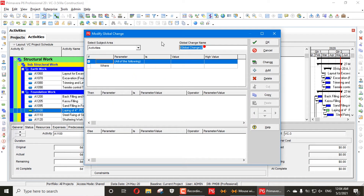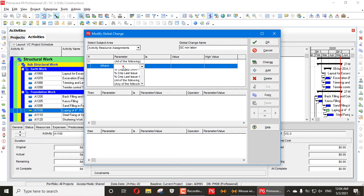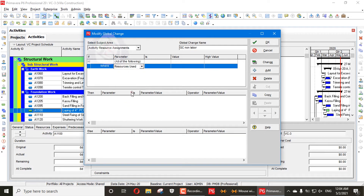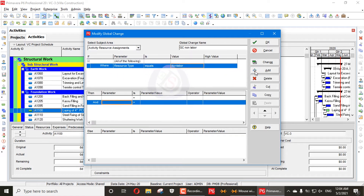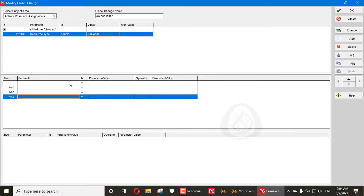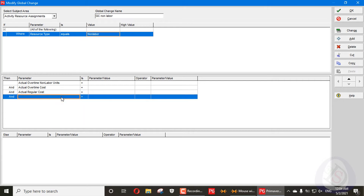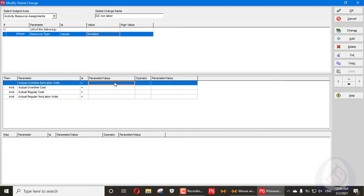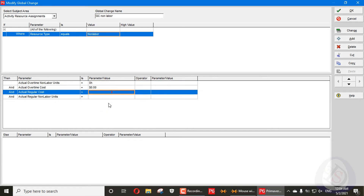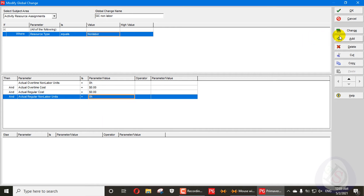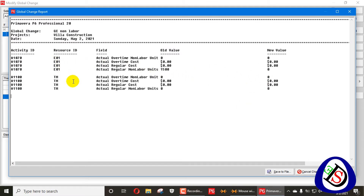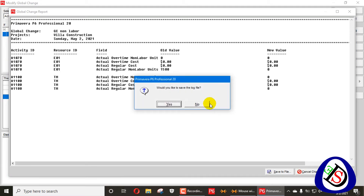Now add a new global change for non-labor, named 'GC Non-Labor'. Do the same steps: go to Resource Assignment, set Resource Type equal to Non-Labor. Add parameters for non-labor overtime, actual cost, regular cost, and regular non-labor — setting each custom value to zero. Apply the change. It changes 15 non-labor entries to zero. Commit the changes and press OK.